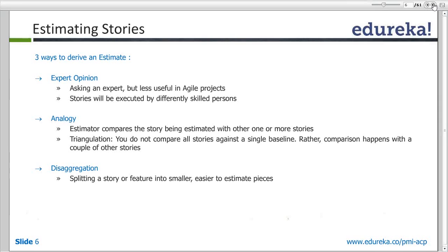Right. So generally what happens, you would have seen that huge companies, like the companies which are CMMI level 5 or CMMI level 4, have this knowledge base, where people across projects, across the globe, have a repository where they dump all the documents associated with their project. This could be even a simple closure report, a simple template of a defect report, or a simple template of release notes, right? So what happens in expert opinion is whenever there is a new project, these companies look for a similar kind of project in their DB, right?